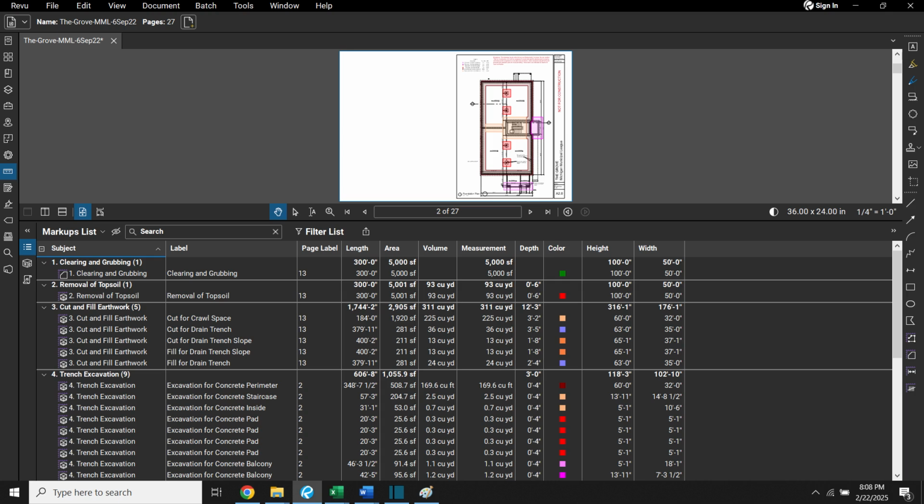I hope this review provided clarity on how to measure the quantity of material for earthwork. Please note that we did not account for swelling and shrinkage to simplify our calculations. However, in larger projects, you must consider these factors depending on the soil composition in your project area.